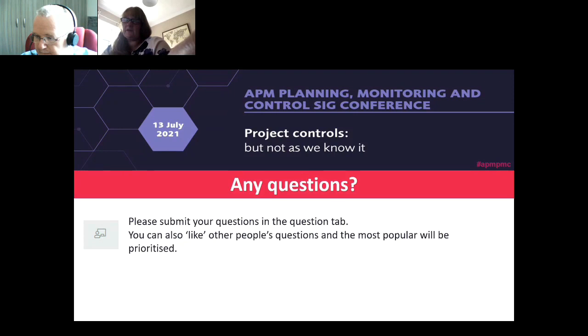And the next one is around how easily it is to transfer existing schedule data into Planview? Right. So if it's in Microsoft Project, it's extremely easy. If it was in P6, then it was impossible. We originally wanted an interface to do that, and we just couldn't get it to work.